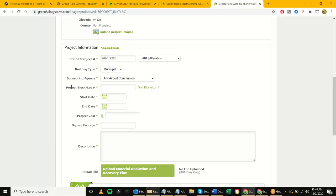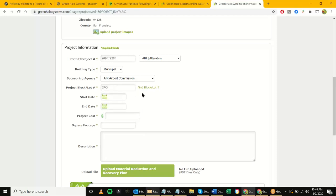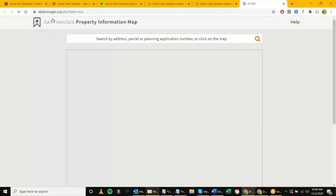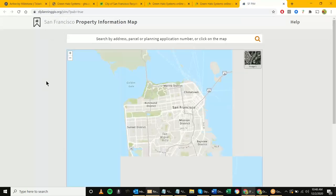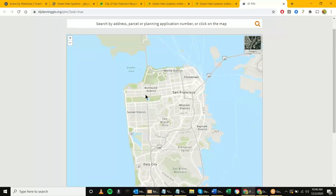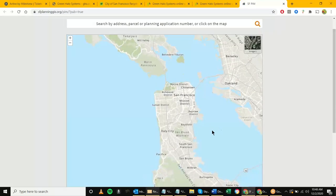Your project may or may not have a block/lot number — it depends on whether it's within the San Francisco jurisdiction. For the San Francisco Airport, you can type in something like 'SFO' or 'San Francisco Airport.' But if your department and project is within the SF jurisdiction, you will most likely have a block/lot number. You can use this hyperlink which points to the GIS mapping — from there you run a search for your address and it gives you the block/lot number.